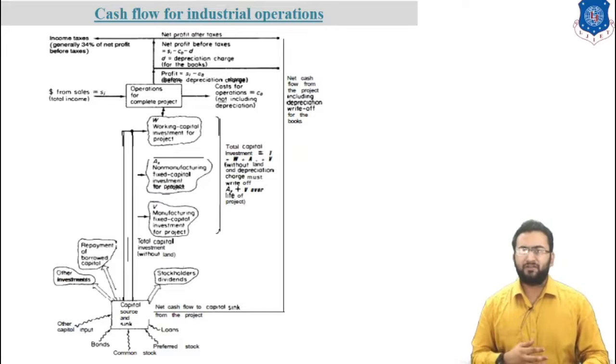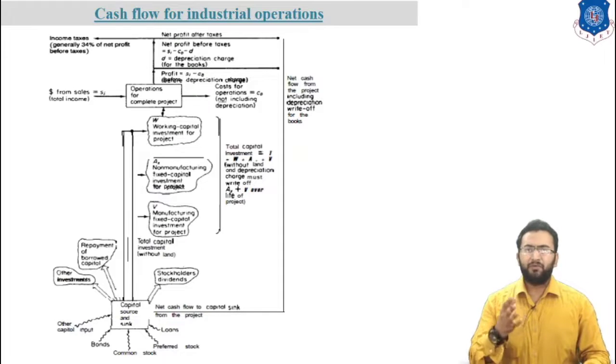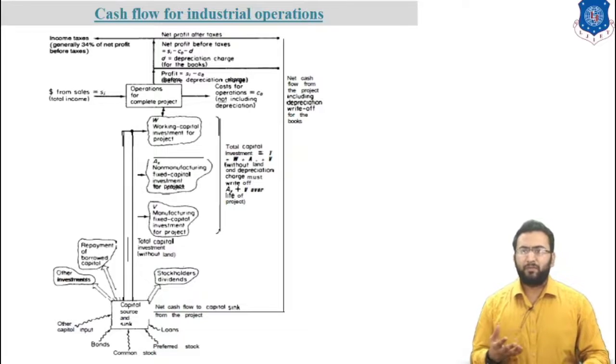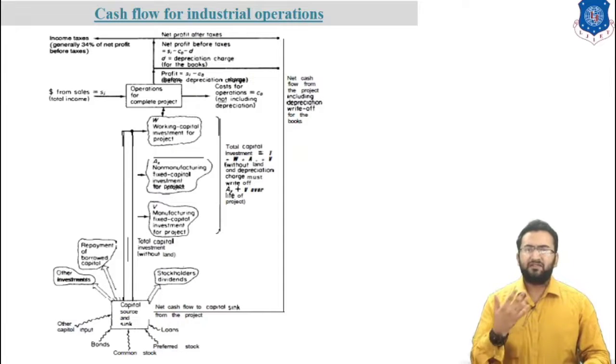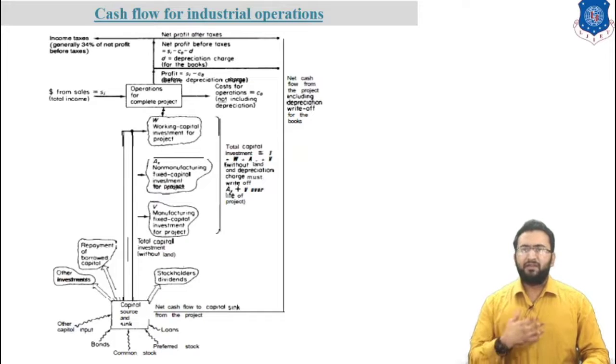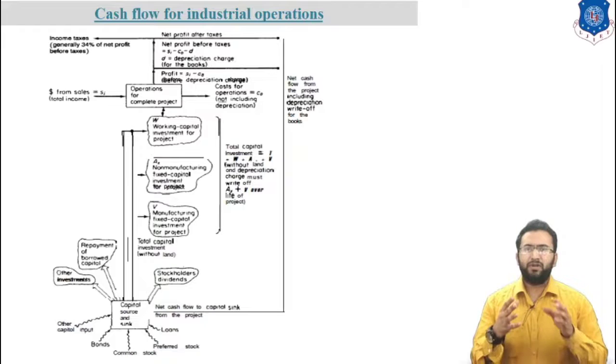and non-manufacturing facilities. The cash flow for capital investment can usually be considered as a lump sum or instant payment, such as the purchase of land with a lump sum payment, or the provision of working capital as a lump sum at the start of operation of the complete plant. Fixed capital equipment can ideally be considered as an instant payment for each piece of equipment, although the payment can of course be spread over the entire construction period when considering the fixed capital investment for